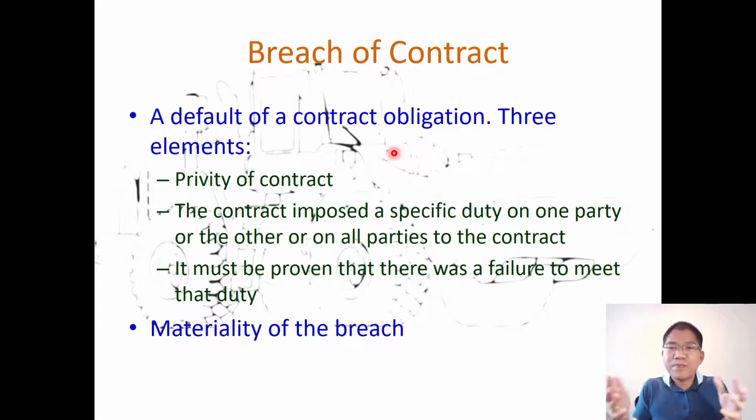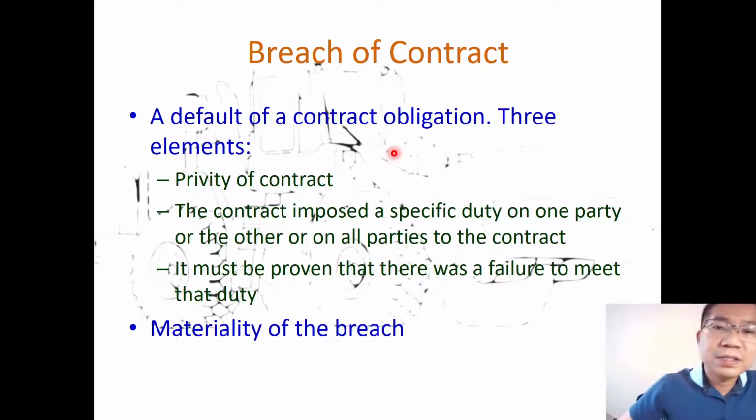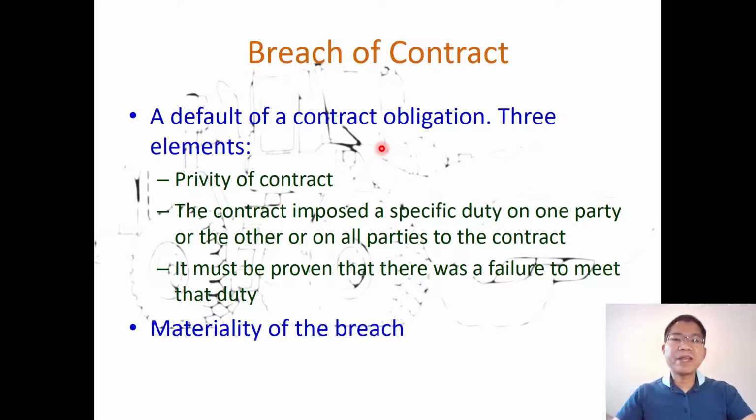Before we say you are in breach of the contract, we need to see whether the two parties have a contract. That is privity of contract. The second is whether the contract imposes a specific duty on one party or the other, or on all parties to the contract.